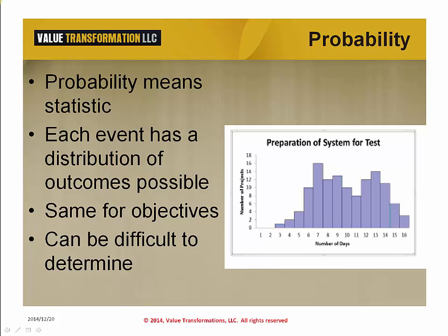Ascertaining the probability of an event can be difficult if we do not have historical data from which to work. Missing that historical information, we rely upon professional judgment. However, each action and objective the project has come with some associated probability. Cascading activities or objectives with defined probability are multiplied together to determine the probability of both occurring. For example, the odds of flipping a coin twice and both times coming up heads would be 50% times 50% or 25%.